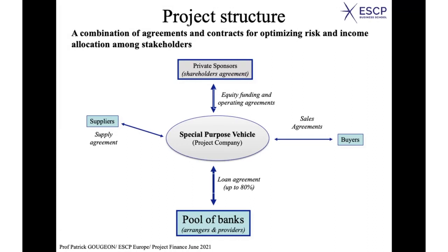Usually, you have a national company buying, the grid, as we call it, would buy the electricity which is produced systematically, and cover some fixed cost when electricity is not needed, and they would guarantee a price for the electricity they buy. So you see, through this sales agreement, you reduce dramatically, cancel out to a certain extent, the commercial risk.